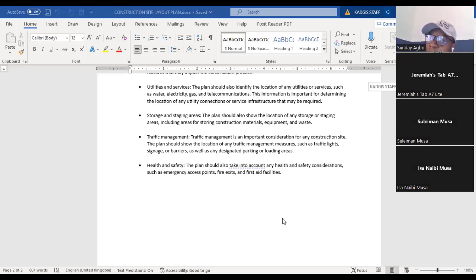What I mean is that you need to understand, okay, you need a security house. You need locations where you can put cement. You need a location where you can put quartz or fine aggregate. Okay, all those things you need to consider. If it is a building that requires reinforcement, you need to consider the locations for that, and then the size of reinforcement that is going to be brought and the magnitude of the site, you understand? So all those things need to be put into consideration.